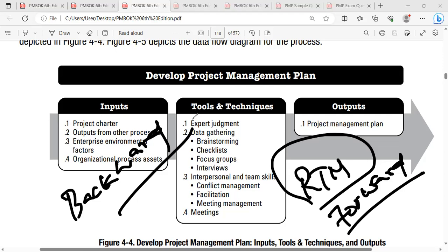And if any modifications or changes happen in between the project, you need to make sure who made the changes, who asked us to modify them, and whether they came with a formal approval to do the changes. Everything should be clearly recorded through the requirement traceability matrix. Whenever you make any changes in the requirement documentation, you need to make substantial changes in the requirement traceability matrix also. Is it clear or not, guys?